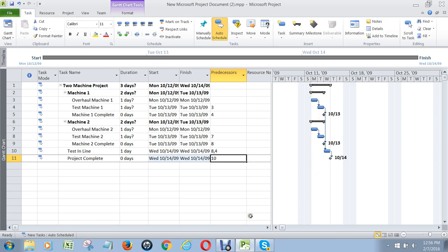So now we have the beginnings of a project schedule, but we're not quite done yet. Because if you have any tasks that have a question mark next to them, it means you haven't physically typed in how long that task is. The default is one, and Microsoft Project reminds you that you haven't actually typed in a number here. So even if your task is one day long, you should still put a one in there yourself so that gets rid of the question mark — otherwise I and others will think you've made a mistake.